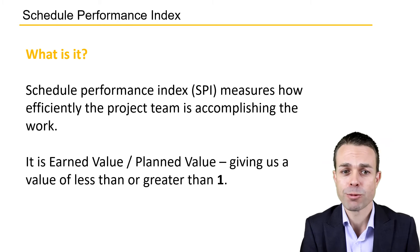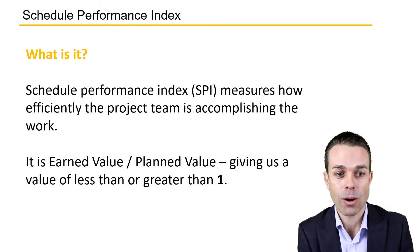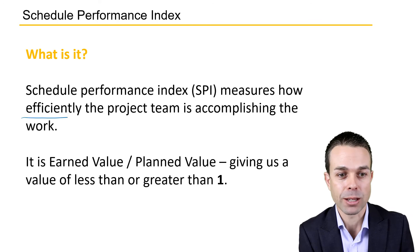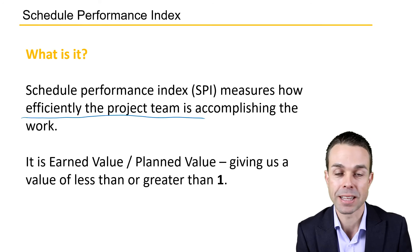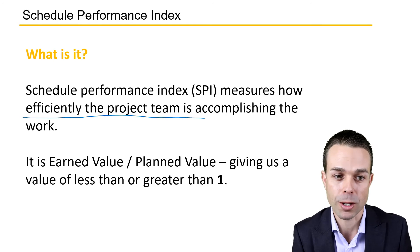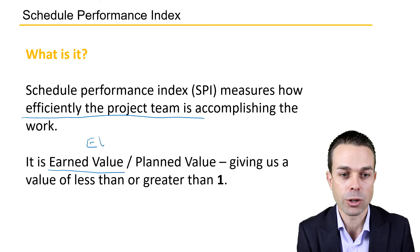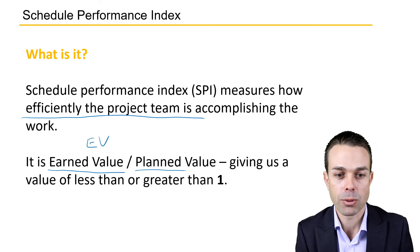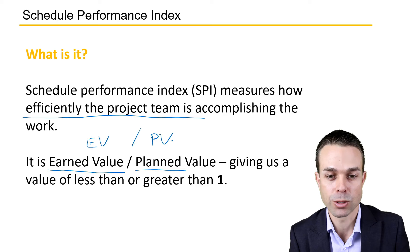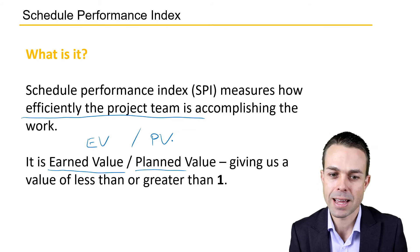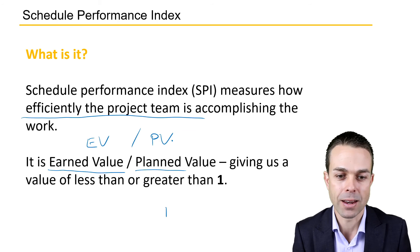The Schedule Performance Index measures how efficiently the project team is accomplishing that work. The way we calculate it is Earned Value, or EV, divided by Planned Value, which is PV. This gives us a value of less than or greater than one.